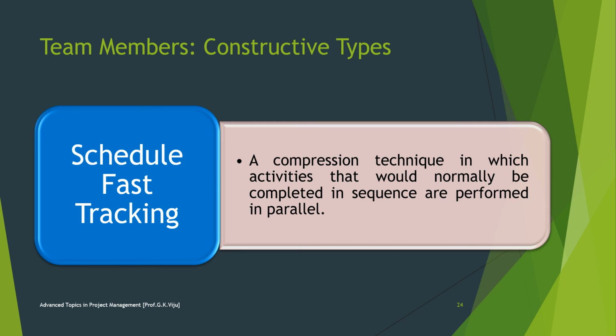In fast tracking, generally you review the critical path and list all vital activities. Then you analyze which ones can be performed partially or fully in parallel with other activities. You will not review the activities on the non-critical path, as they have float. Reducing the duration of those activities will not affect the schedule, it will only give more float to them. You should monitor the other paths whose durations are close to the critical path. If any other path becomes critical, you will reduce the duration of the new critical path. In this case, your current path will no longer be critical.